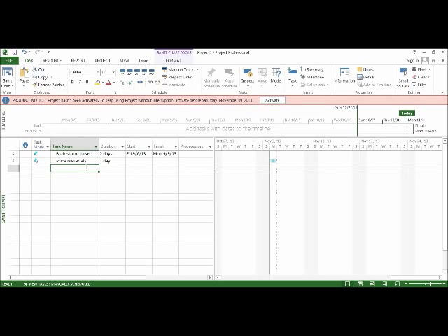The next thing we wanted to do was, because we're not doing the whole project by ourselves, we wanted to price the labor. So how much is it genuinely going to cost us to hire outside contractors to come in and do some of the labor of the work? That took us about 1 day of research. We did ask around in Home Depot and some professionals, some people we knew, of what do they think a rough estimate of what the labor would cost. Because we have those couple of estimates, we were able to go ahead and create a budget.